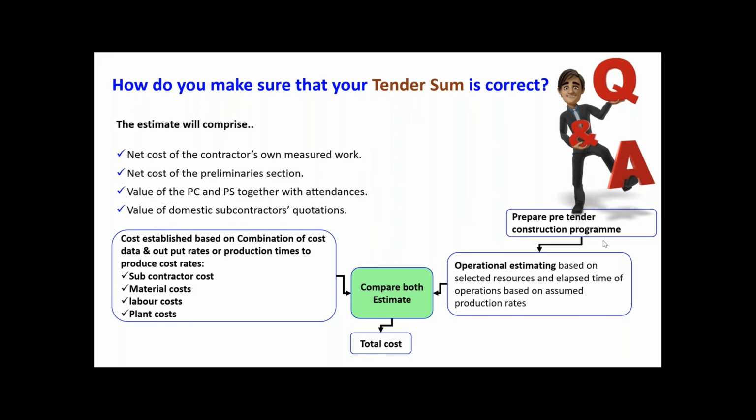Say you don't have the operational team estimation. What can we do? Benchmarking. How do we do the benchmarking? There is another way. Say you are doing an apartment building. You can see the apartment building next to you, recently completed, and how much they have incurred. You see your estimation and their product price, then you can have the comparison and get an idea whether your price is okay or not.